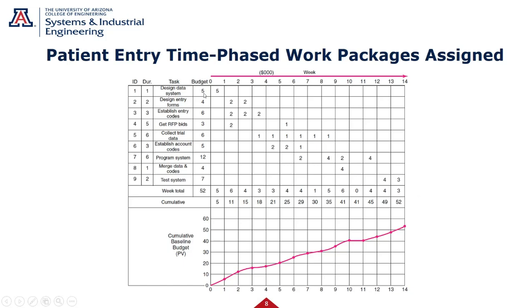So first, each of the teams came in and told you it would take that much for the task. We have now spread that out, given our linkages and our resources, and said, okay, it's going to take 14 weeks, $52,000. Those two numbers should agree. It's just how we spread them out, and you can see how our costs grew along the project. That gives you a nice graph and tells you where you are. This now gives us a baseline to measure to.